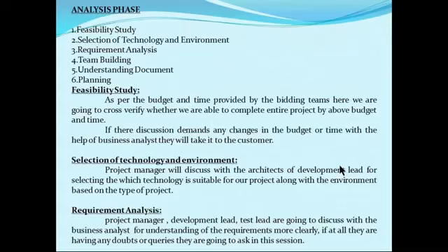Here during the analysis phase, first they have to go for feasibility study, selection of technology and environment, requirement analysis, team building should be done, understanding document should be done, and also should go for planning. What is feasibility study? As per the budget and time provided by the bidding team, here we are going to cross verify whether we are able to complete the entire project within the above budget and time or not. Feasibility means which is possible, which is not possible.